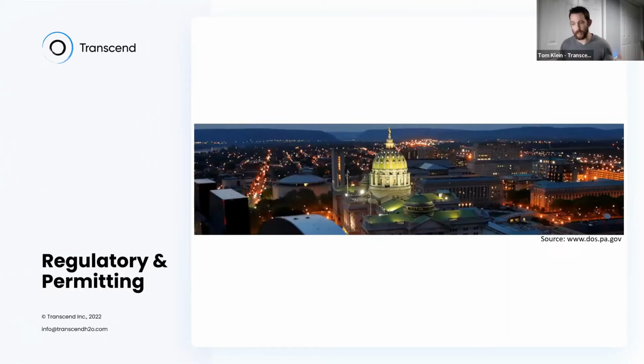And what I mean by that is, if you are changing your facility in some meaningful way and you need to go to that regulator for permits, you might not be necessarily in a position where you're making upgrades in the form of new assets, but maybe you're just changing the way the plant operates. And those kind of discussions are typically done in the following order. Ordinarily it's a complete design, by the way. So you do a design, fill out permit applications, you go to an environmental regulator and you discuss. They render a judgment one way or another on your permit.